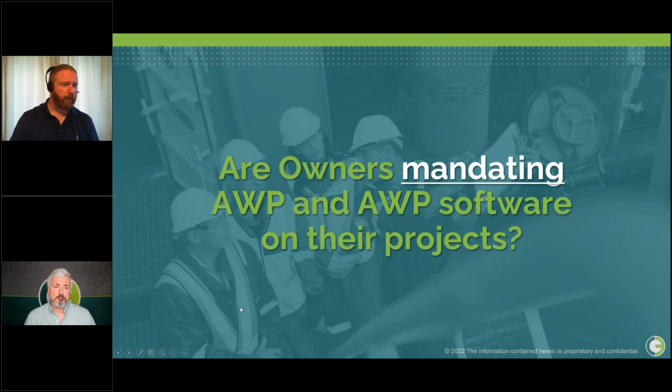Okay. Next up, are owners mandating AWP and AWP software on their projects? Yeah, it's a good question, and it depends on different scenarios. More and more owner companies are mandating AWP on their projects. We heard Shell talking about this being part of their core process, but most will typically shy away from mandating the AWP software when it comes to greenfield projects. They want to allow the contractor to show their experience with AWP and demonstrate how they'll manage the process.